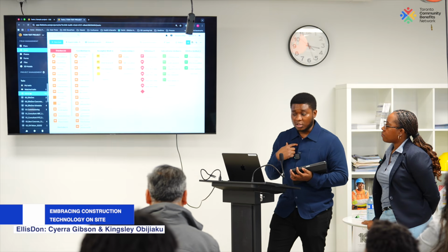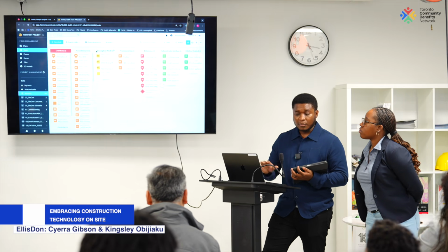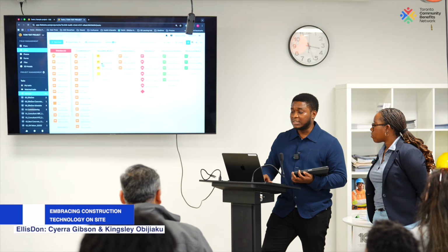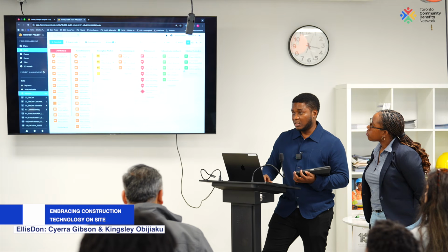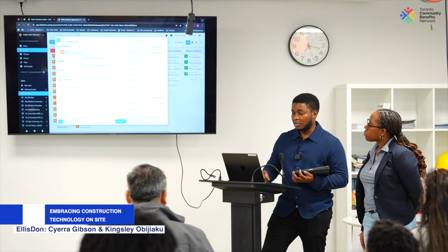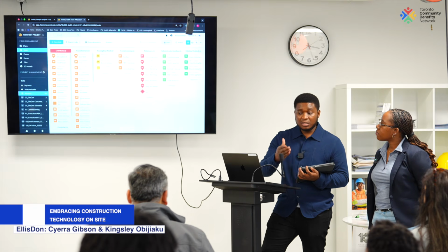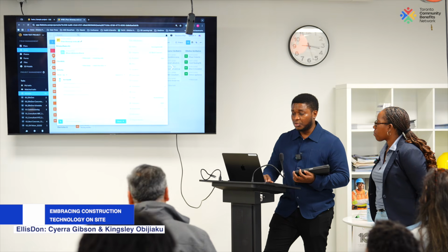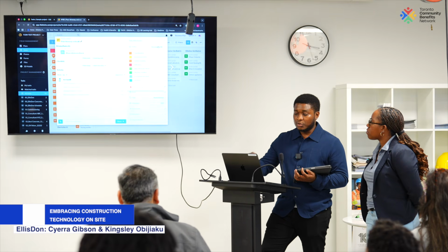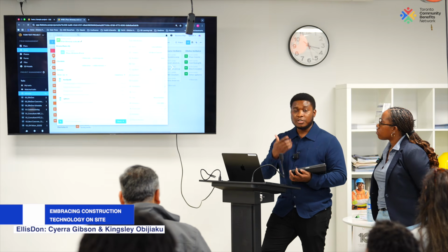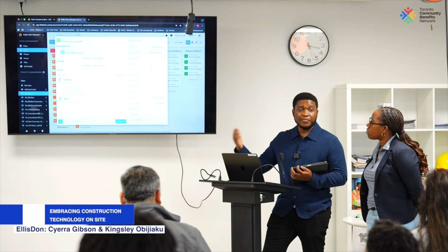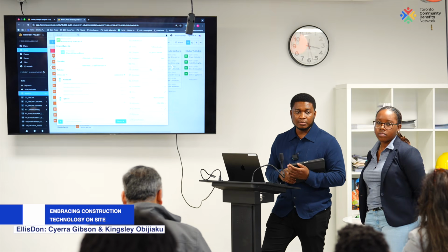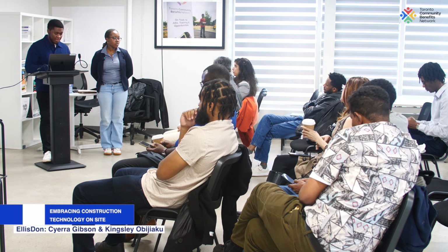Right? And so if you as a sub, like I said, complete that, I would then go in as a GC for EllisDon and use the filter option to filter according to deficiency or the status. And I can just drag and drop. If I feel like this incomplete work is now done, I could just say it's done, EllisDon verified, and I just drop that and that's it. If you as a sub have been assigned a job and it's incomplete work, and you go in and put all your information, you can change the status. The system will only allow you to say subcontractor verified. And I, as an EllisDon employee, have to go in and verify that it's completed according to our standard. And if it's not, we're going to have a discussion. So it's that simple. So it gives you visual information.